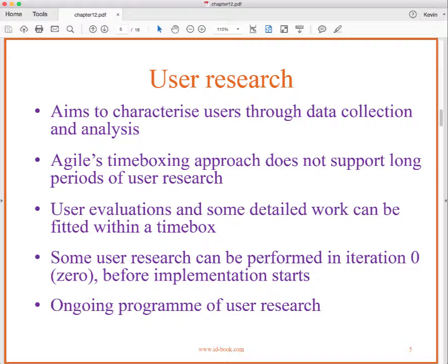They develop the road map for developing and implementing the product. And what we're going to say, and let's call this sprint 0, and we're just going to say, well, we're going to do our original bundle of user research and interaction design activities during the sprint 0 time. Okay.